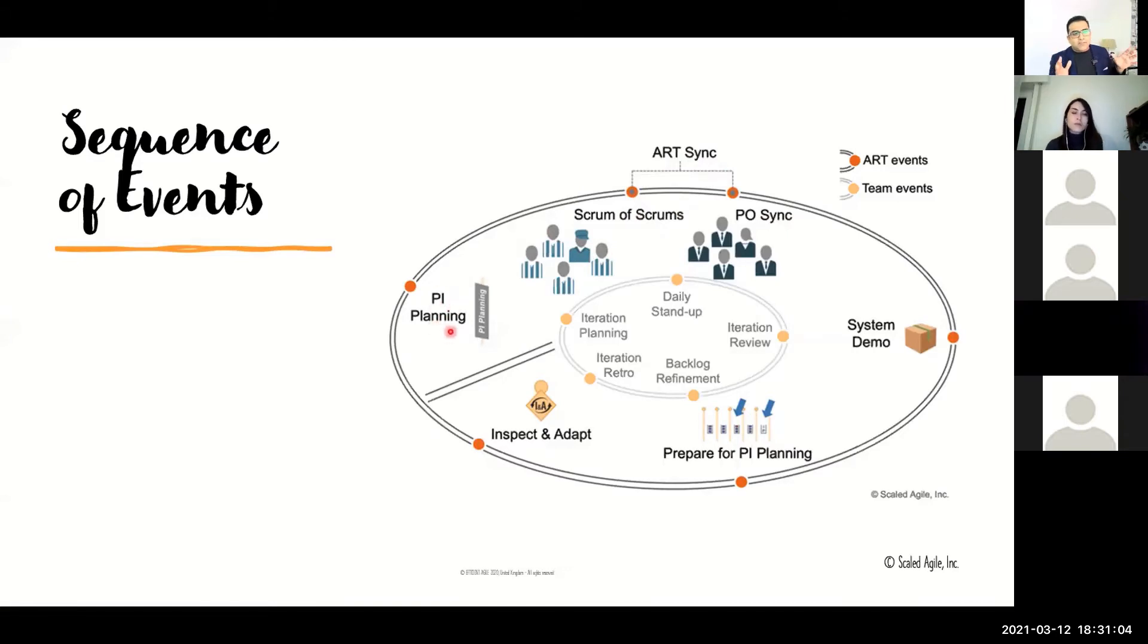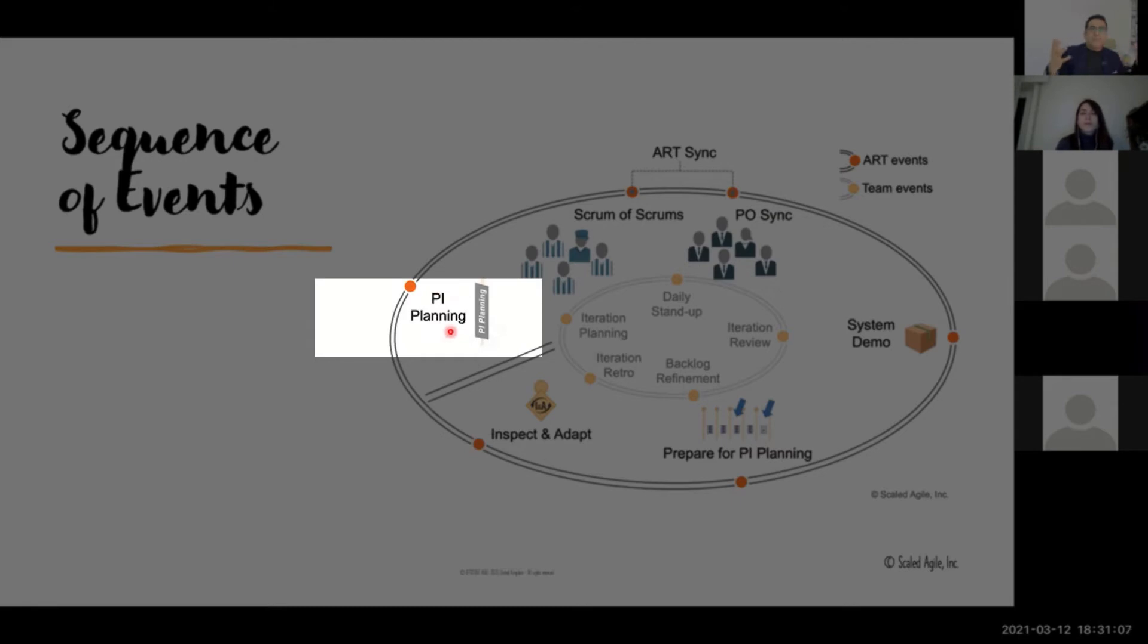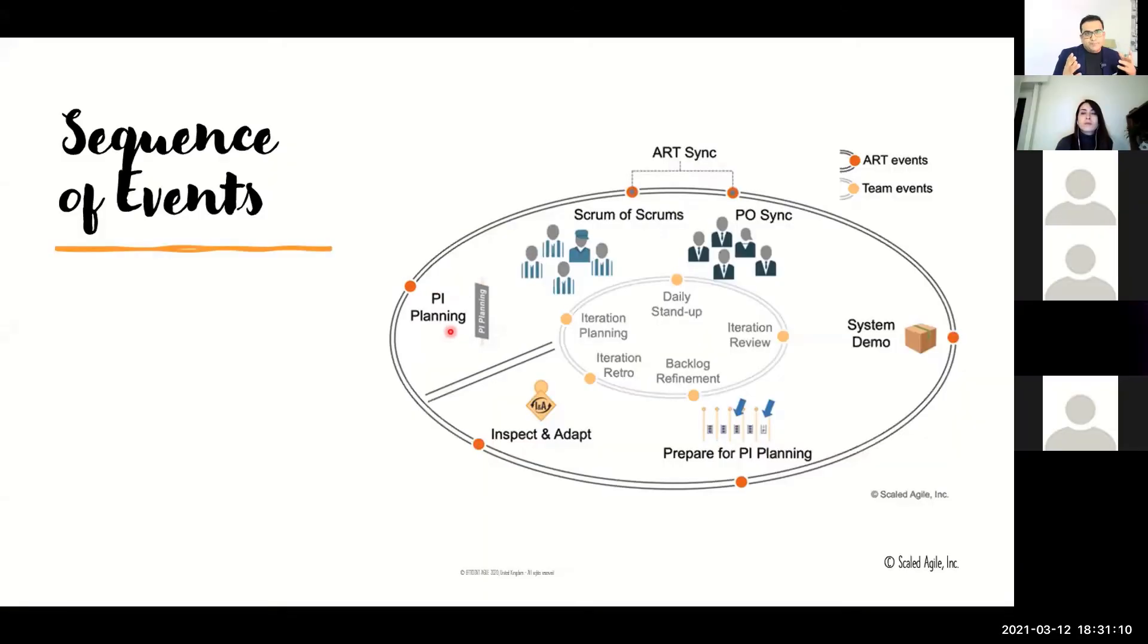Going back to the PI planning, the PI planning is an event, like a big room planning. It takes place for two days. You have upfront preparation for PI planning, so you have to prepare your features, refine them, keep them ready. Have a definition of ready for your PI. In the remote world, I recommend you run it for maybe two or three days to keep the energy level high.